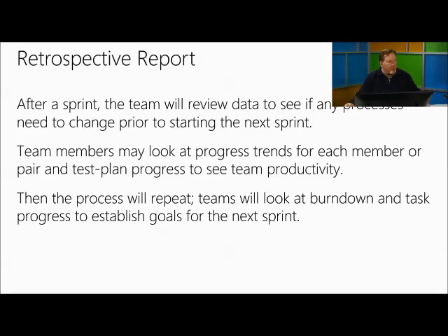So you talked about the retrospective report, how important that is after each sprint. Tell us a little bit more about that. Sure. The team members are going to look at the progress and trends for each member, and then they're going to pair that progress and see the team's productivity. Once they repeat that, they'll look at the burn down, and they're going to establish the goals for the next sprint. Great.